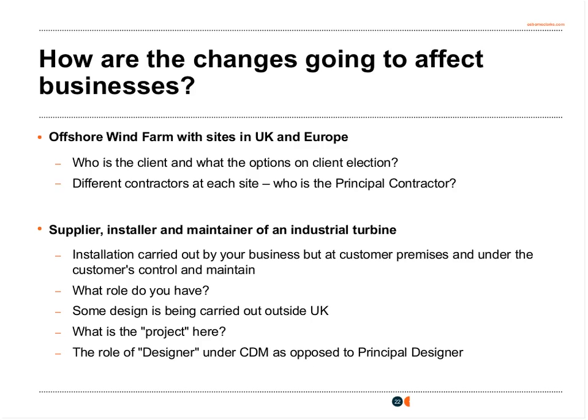Additionally, and I touched upon this earlier in a domestic client situation, under Regulation 9, a designer has specific duties not to start work until they are satisfied that the CDM client understands their duties under CDM.